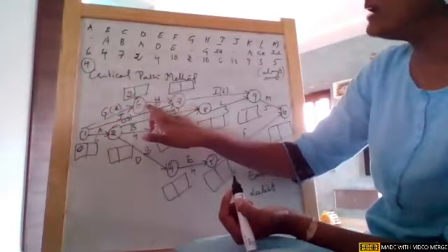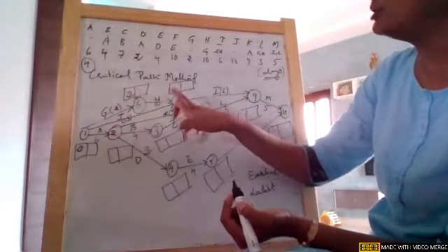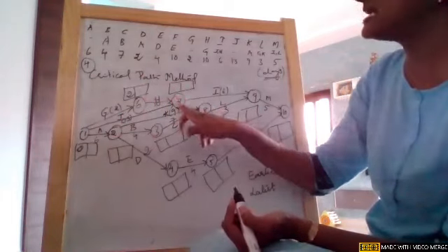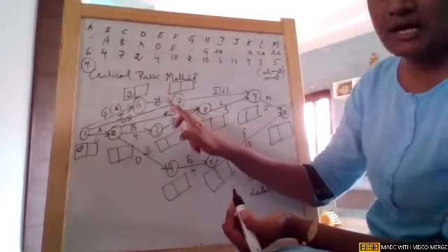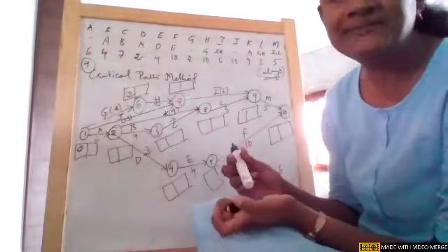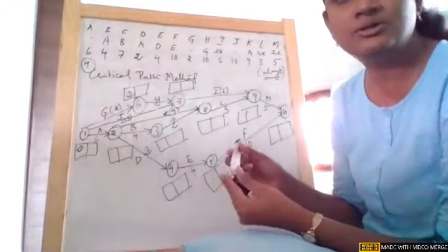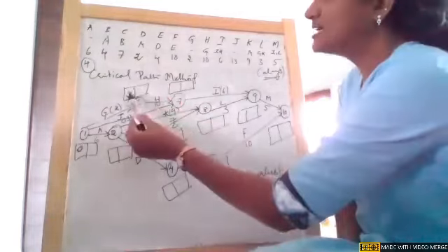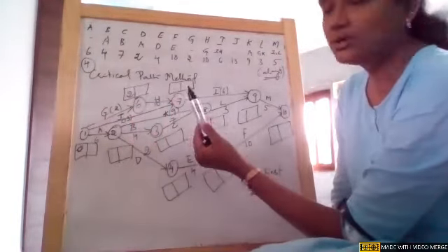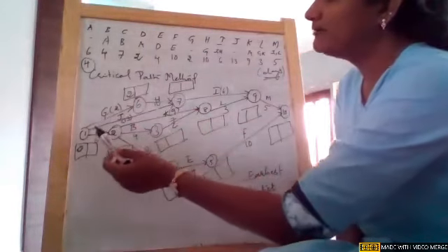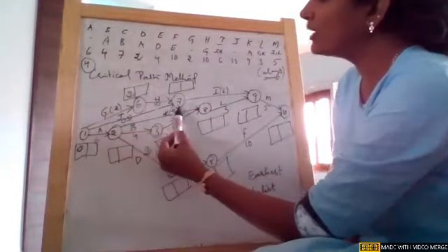When I go after this, if I want to continue from 6, we are going to node 7. It is taking 10 days, but there are 2 arrowheads. When there are 2 arrowheads, whatever is the maximum duration, I need to take that. This duration gives 2 plus 10, which is 12. Okay, girls, let me see what the other arrowhead gives. 0, it is directly going to node 7.